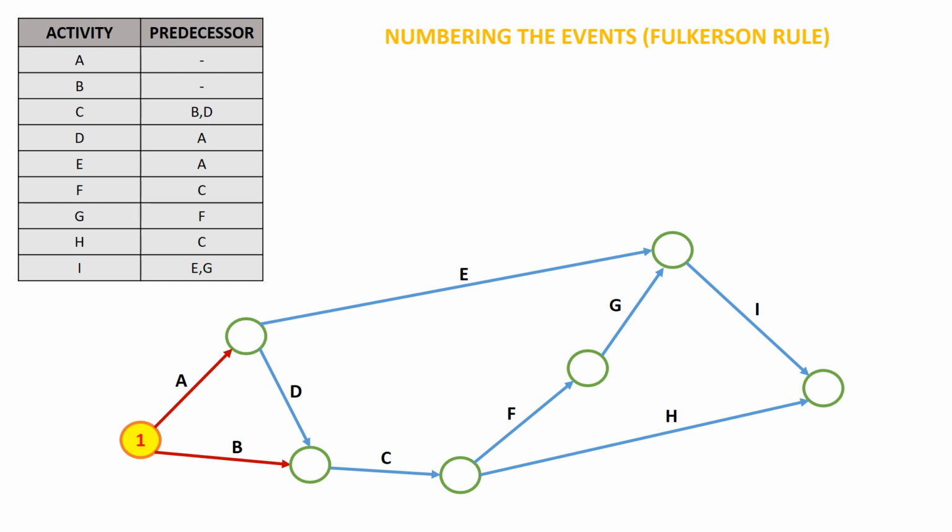After tracing activity A and activity B, now we'll mark which events have been completed. In order to mark the events which are completed, we have to consider the event and see if all the incoming activities have been traced or not. From the network, you can clearly see the event after activity A has been completely traced.